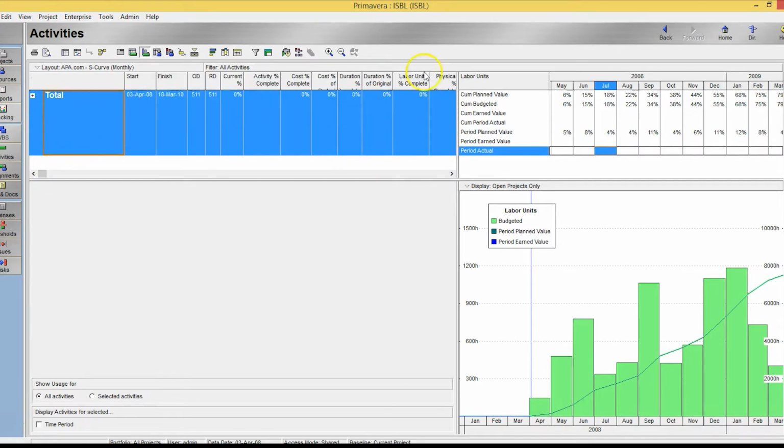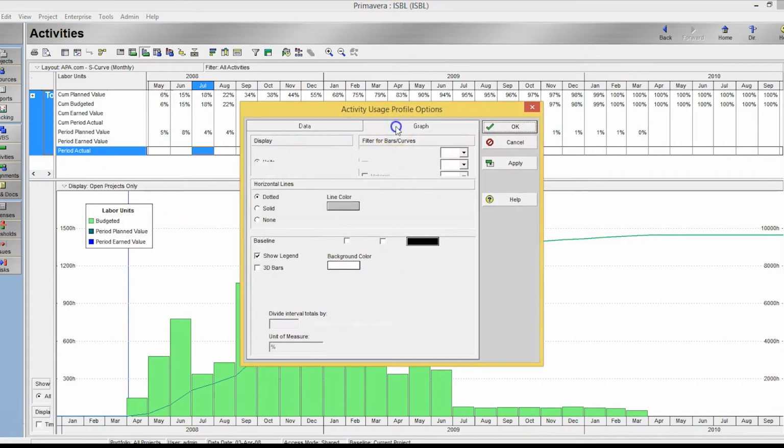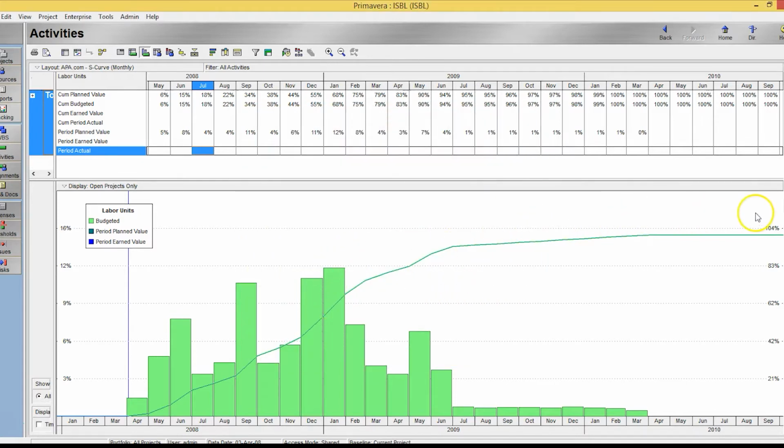And you can see here, this on top is the activity usage spreadsheet. Below, you have to do the same math. You have to take the denominator minus 2 decimal points, so it has to divide by that to emulate a percentage. You see here is man hours. I'm going to convert that and it'll look like percentages. And I have the symbol of the unit of measure.